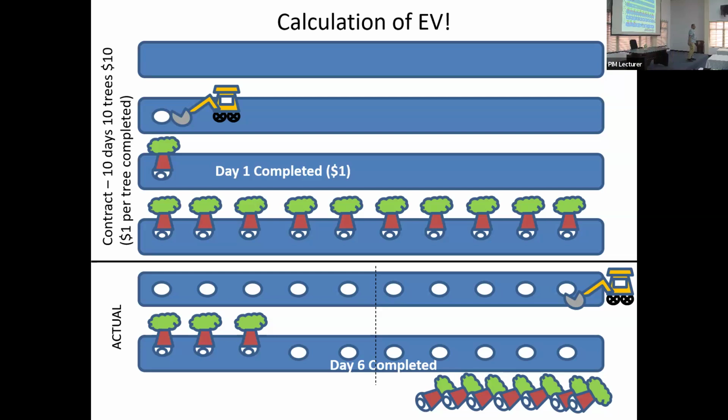So earned value will say, therefore, pay $7. Not 3, not even 6, but $7. That is what it says. What is the site worth, and what is required to complete the job. Right. So this is the fundamentals of it.